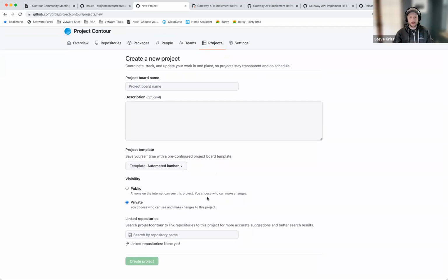I feel like the way these are designed, they're not intended to live on indefinitely. You define a new project board for the next release, and within that you'd have to do, in progress, and done. Then when the release is done, you close that project board and create a new one. That's the feel I get from GitHub as far as how they're intended to be used, which is not the way we're currently using it. But we could. Now that we're going to these 3-month releases, maybe it would make sense to make four a year, ish.